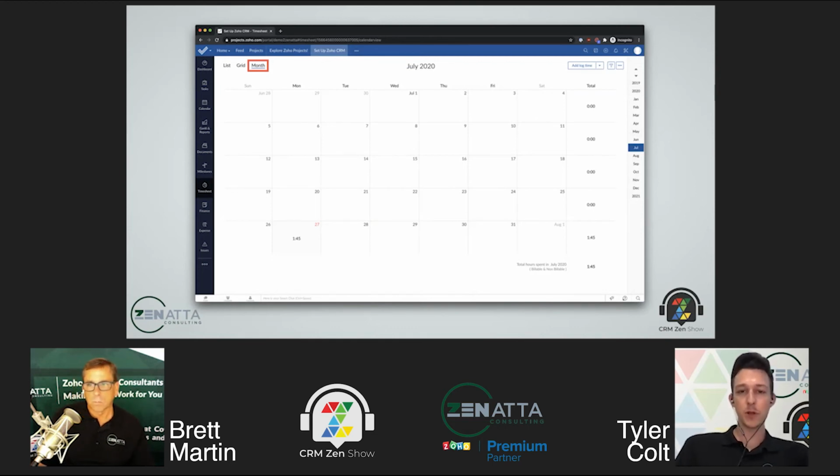If you ever feel that you're falling behind on a couple of milestones, maybe you want to hop in here and say, did we get started on this too late? Right. So if we were supposed to deliver this by the end of July, but there's really no logged time for that first week, maybe we want to use that and work on our spin up process to make sure that we hit the ground running when we're working on these projects. So the timesheets are useful for a lot of different reasons. Of course, for tracking your cost or tracking any billable time. But it's also useful to make sure that projects are being worked on consistently, and that they're getting started on time, and that we have a nice burn rate through each of these projects as we're working on them.